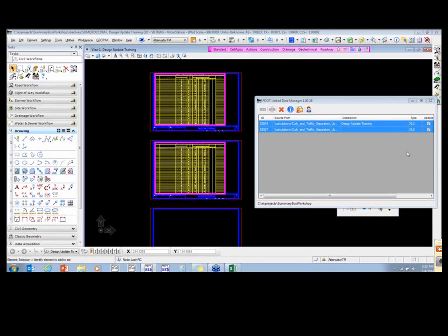Or, as you said, go out and take field reviews and mark those in where you need them. Right. The easiest thing, if you know that it's a sidewalk project and you've got sidewalk work in that project, is to make sure that information is spelled out clearly in the scope of work for the surveyor, for them to gather that information for you.